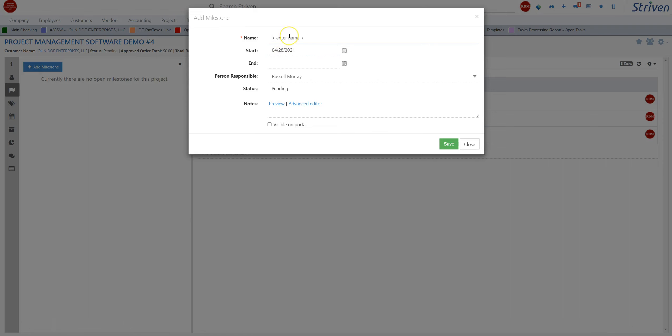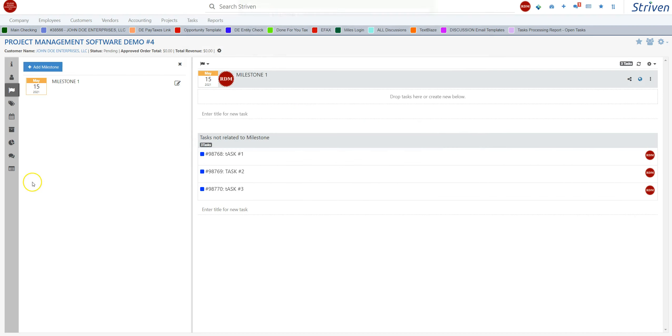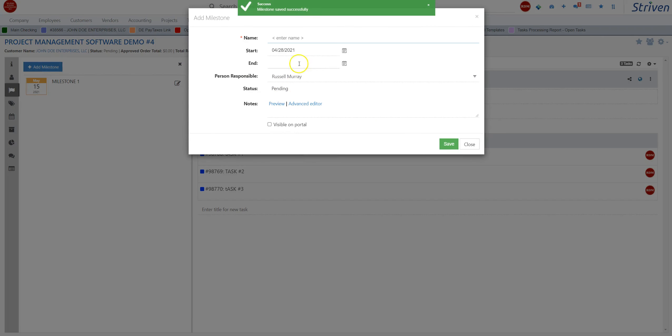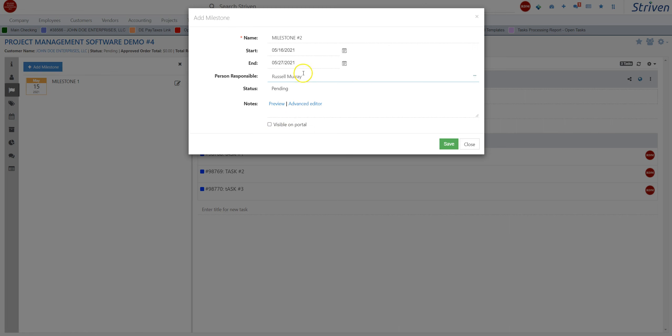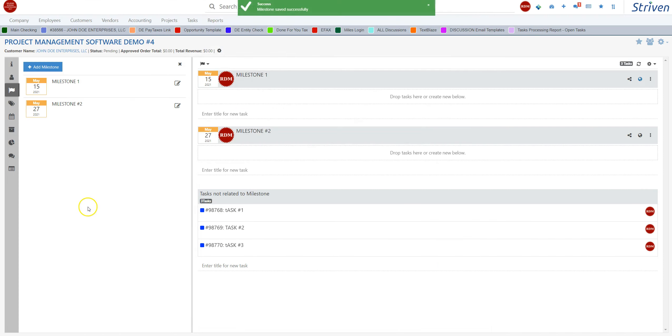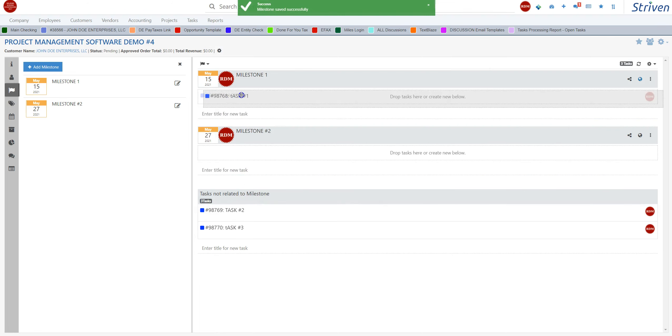If you click on the flag, you can actually add a milestone. We'll do milestone one for the middle of the month. You can make it visible on the customer portal too, which is really nice. Whatever you want to make visible to your customer, you can do it. Maybe milestone number two, which is going to start on 5/16 and end on 5/27, maybe you don't want your customer to know that, so you leave this unchecked. Here's your two milestones.